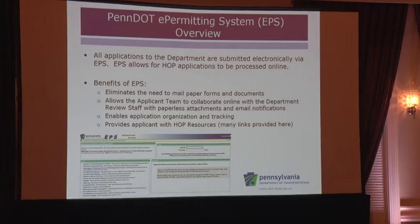We go by a 30-day metric, so we have 30 days from when that application is submitted to make a decision and turn it around, whether you get a permit issued, which is a rare instance on any low, medium, high, or any local volume driveways. We go up to 30 days, and it would be returned for revisions, and it would continue another cycle. And we'd go another 30 days once you return it back to the department. In most cases, driveway apps will go through several 30-day cycles. Could take some time.